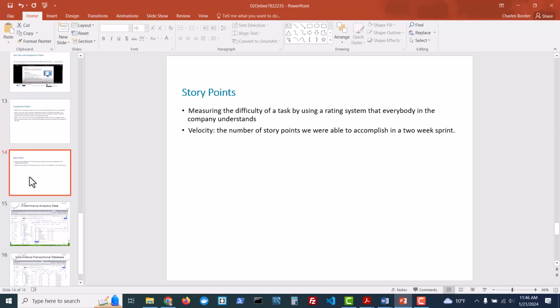Now, you can do that or not in Azure DevOps. I think that's really kind of up to you. Or what you could do is do it after you've completed a lab so that you can look back and say, we're doing another lab in 2 weeks. How can we make our process better? Maybe the SQL side of things is really easy, but the layouts in Data Studio are hard. In which case, maybe we don't divide things up between one person doing all the SQL and somebody else doing the layouts. Maybe we find a different way to divide up the work.